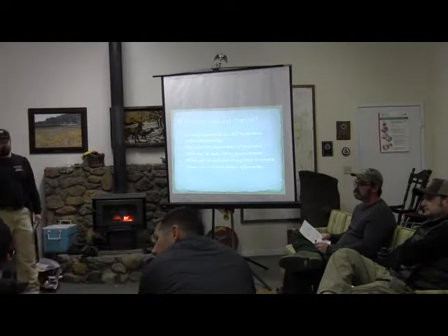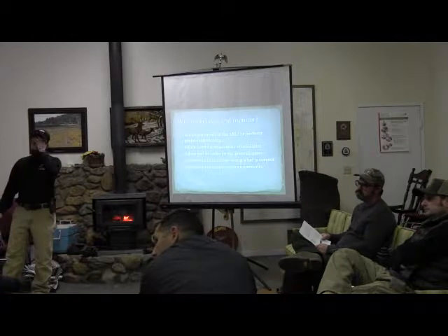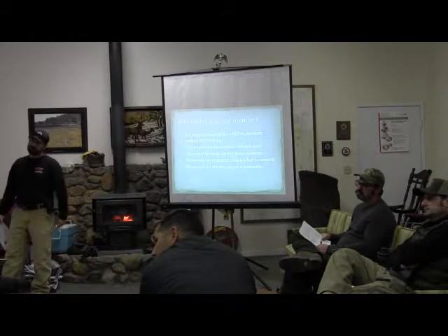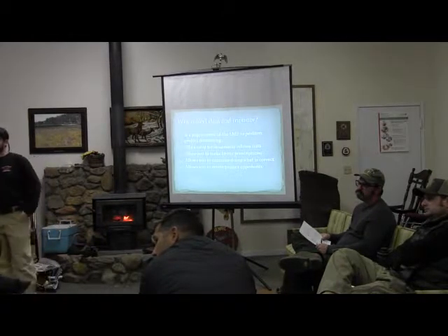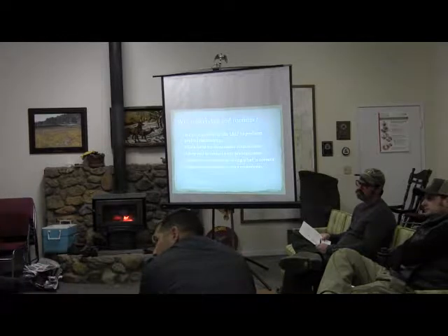Also on the San Jac, I don't like the term, but they're called daily diaries. It's pretty much a sheet, and you kind of take like an AAR approach. We'll plan what happened. Yeah. Basically documenting everything, especially conversations with our cooperators, like on the CAL FIRE agreements and stuff like that. I know that goes into the folder where all the pictures are. Pretty much each project has its own little folder.